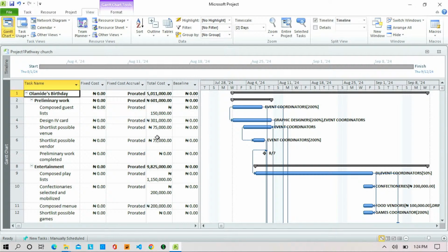Now, during the course of reviewing what you have planned, part of the people that came for that review session suggested or made corrections to what you have planned. Am I communicating, please? And what they suggested actually makes more sense or is more cost effective than what you put on the table. So to effect that change, a change request has to be generated.